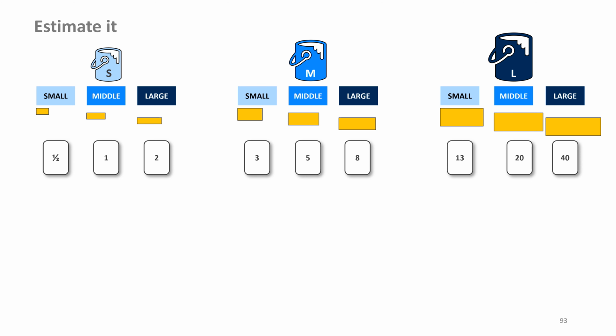There are 2 ways we arrive at these values. The first variant we do with teams that have not been working together for so long. Magic estimation is suitable for this. We start with a user story and put the note on the whiteboard. Then we take another user story and estimate: is it the same size, bigger or smaller?